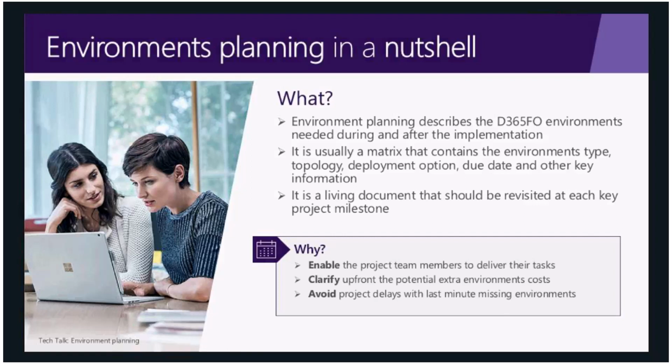It's very important that you take the time to do that early in the project to basically avoid last-minute missing environments. One key thing that we will discuss about is this impact on your project and go-live date. Purchasing an environment, it's not a trivial activity. It can have some lead time. So if you plan early what environments you need, you can take all the preparation steps to get them on time.